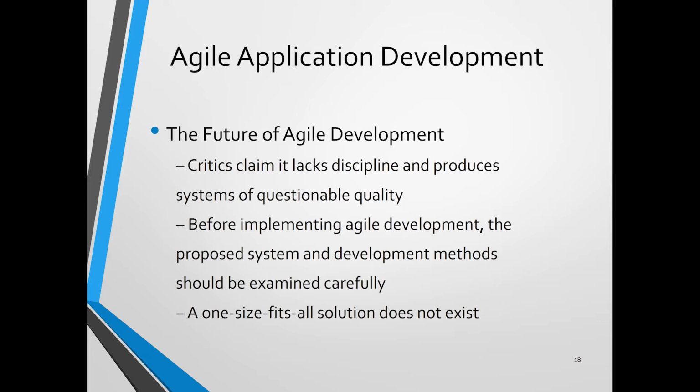But before we implement agile development, the proposed system and development method must be examined carefully, to see whether the agile methods work with this team or not. Suppose the users always don't have the time for you, agile may not work.